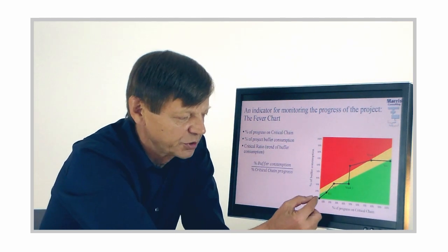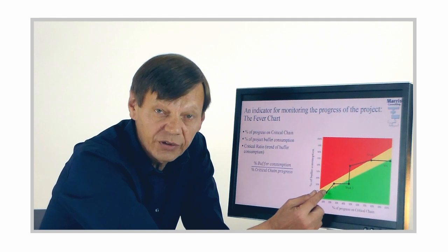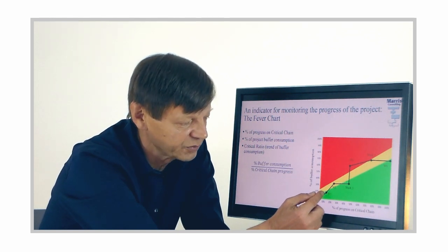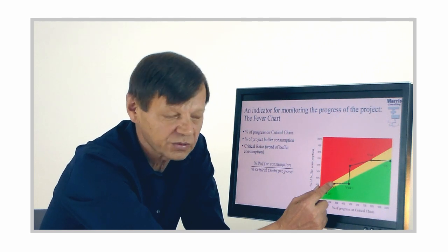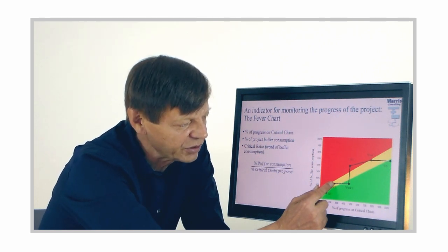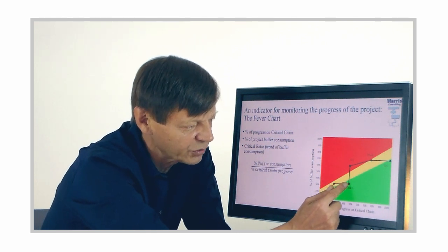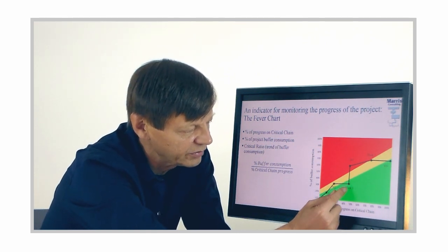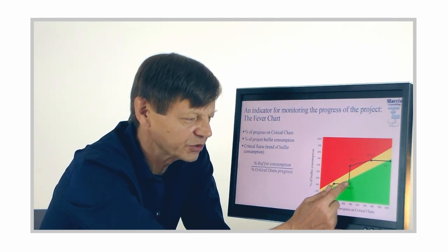It starts here, obviously. After a week, it gets to here. It's consumed some of the buffer. That's normal. That's what it's there for, but nothing worrying. End of the second week, it's up here. Watch out. You need to keep going a bit faster, please. And so yes, for a whole week you're going at the speed expected, and so you're going horizontally, and so that's the status on week 3.